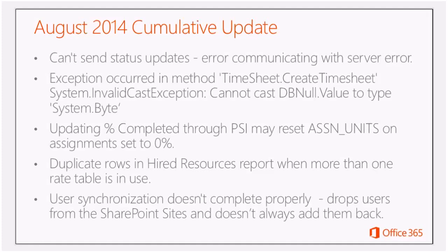On the second one here, you were simply adding some actual work and then the crash would occur. In this particular case, it was occurring when you had the options enabled that say that you want to reschedule the incomplete work to the status date, that sort of thing turned on. It was crashing as a part of that actual work entry. So we've fixed those two crashes.